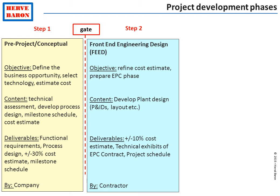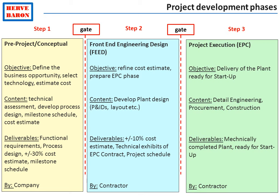At this stage, the plant design is developed to a rather high level of detail, which then will allow — should the investment decision be taken — to move to step three, which will be the project execution stage. This will normally be contracted by the client, the oil and gas company, to a contractor under a fixed-price project contract, called a lump-sum turnkey contract. In other words, at this stage the company has entered into a contract for which it will get a turnkey plant for a fixed price and a determined schedule.